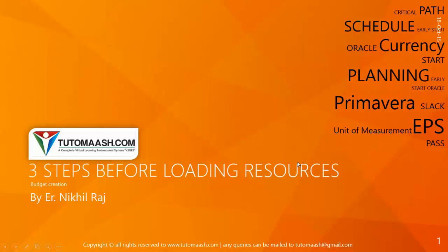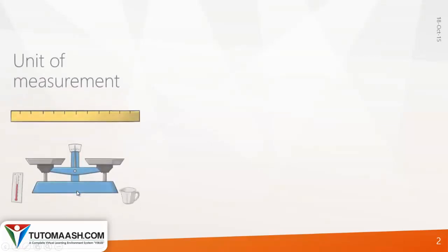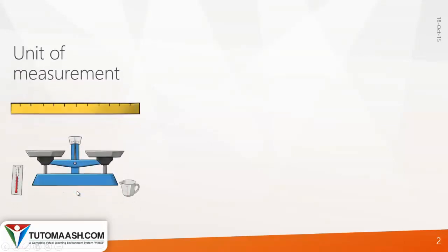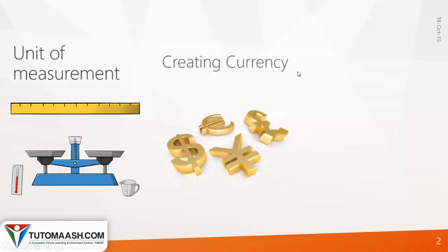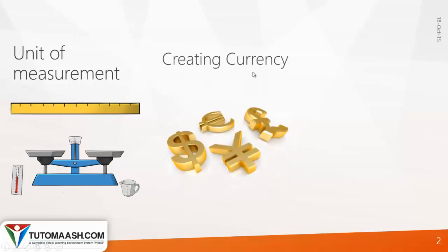In Primavera basics, before you start creating resources, you have to do three simple steps: unit of measurement, creating currency, and assigning currency.